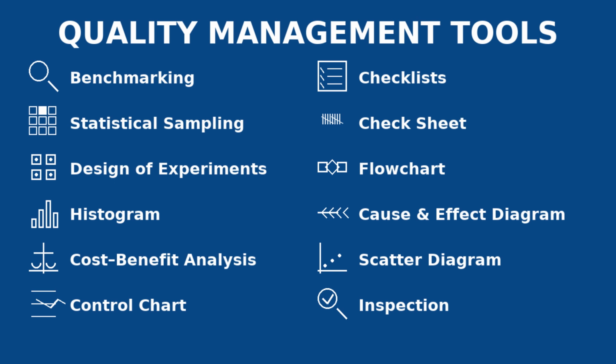We move on to the third project manager and see what action he is performing. You can see that he is performing evaluation of factors that will have a great influence on particular variables in a product. He is performing the evaluation of factors not only for a product but also for a process. What is the tool that he is using? He is using the design of experiments tool. DOE or design of experiments is a structured testing method where you are going to identify the cause and effect relationship between variables. Let's move on to the next project manager to see what action he is performing.